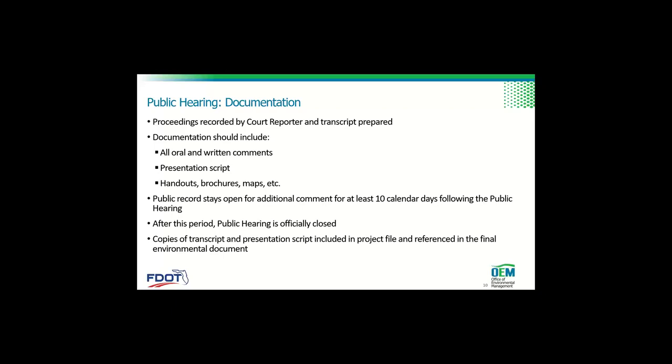The public record stays open for an additional comment period for additional comments, at least 10 days following the hearing. Right now, we're suggesting that you extend that time because we're oftentimes putting stuff up on websites and it takes people a little more time to get to them sometimes. So please feel free to go beyond the 10 calendar days, depending on your project. And then after that period, the public hearing is officially closed. The copies of the transcript and the presentation script are in the project file and referenced in the final environmental document.